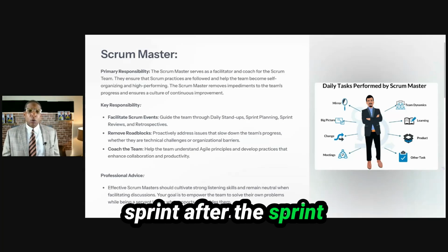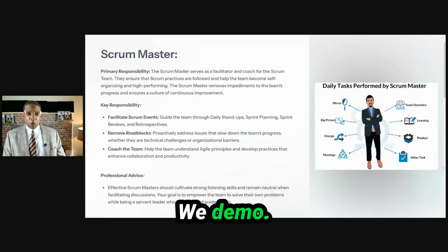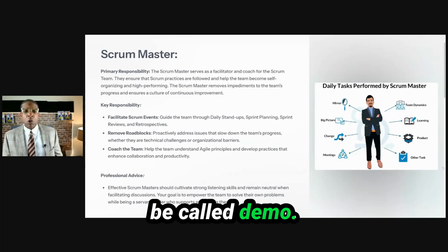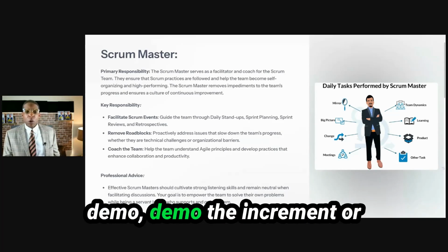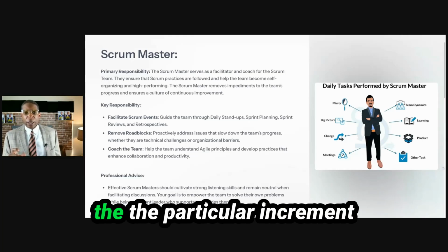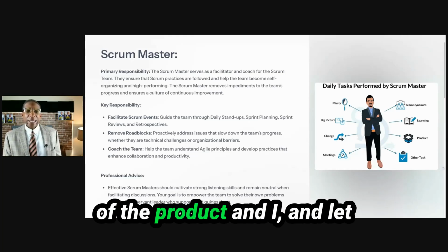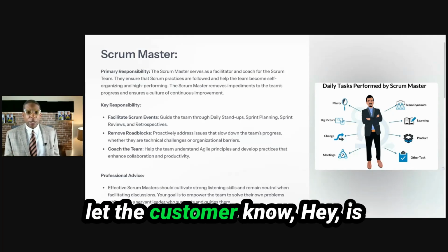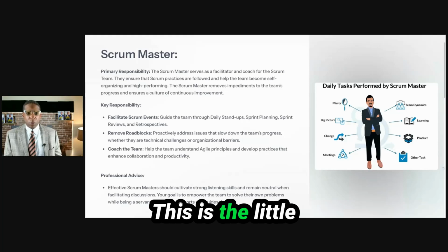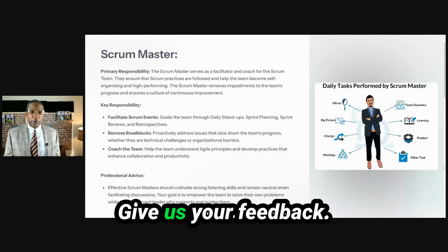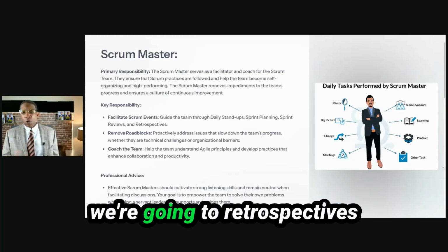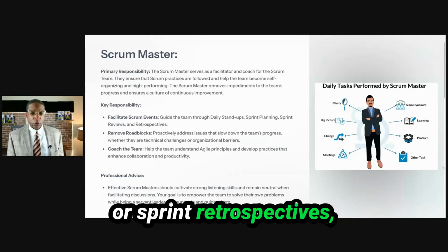After the sprint comes the sprint review, which can also be called a demo. We demo the particular increment of the product and let the customer know, hey, is this what you're looking for? This is the little piece that we built. Give us your feedback. And then from there, we go into sprint retrospectives.